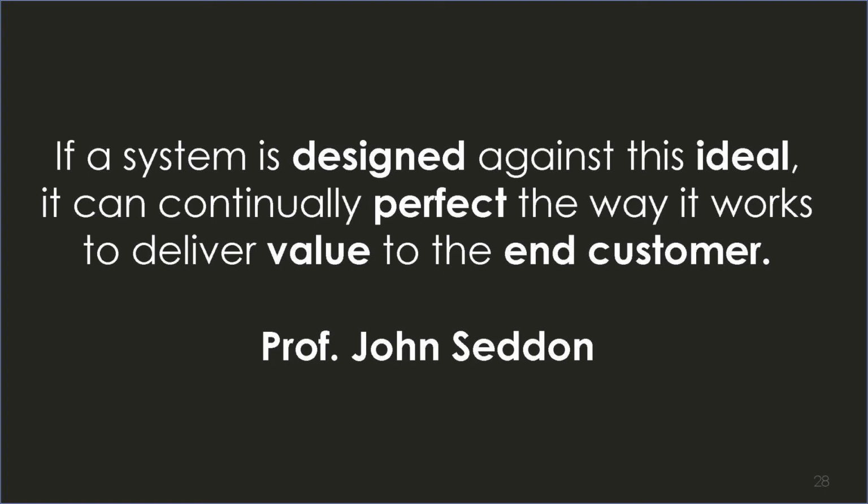I sounded a bit abstract, but this is very concrete. This is a feature team adoption map. If a feature team is 100% feature team, it does everything. The lower axis here is the definition of done that you know from single team Scrum. So it does everything from coding, unit testing, designing, integrating, end user acceptance testing, even code creation, across all the components. Then we're here, the magical, ideal feature team. We co-create with the end user and then implement it across all the 500 components. You see? But most teams are here. They do some unit testing, some coding, and maybe integration, and then do it at one component.